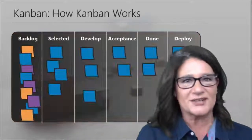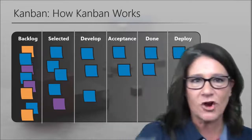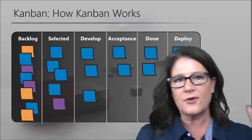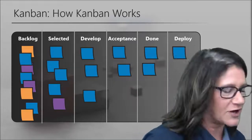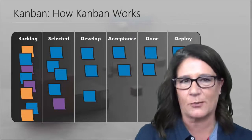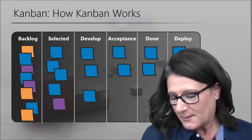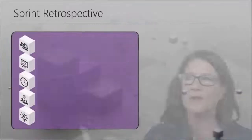Toyota was trying to figure out supply chain — controlling logistical supply chain from the production point so there wasn't too much work in progress, because that's how defects and rework happen. They created what's now Kanban. The same thing is used in buying anything today: you buy OJ, they scan it, one goes into inventory, someone else buys it, another goes into inventory. They're not storing things in the back anymore. It's a process flow of the board — Kanban cards, Post-it notes, digital Post-it notes — to signal the need to move materials and optimize workflow.